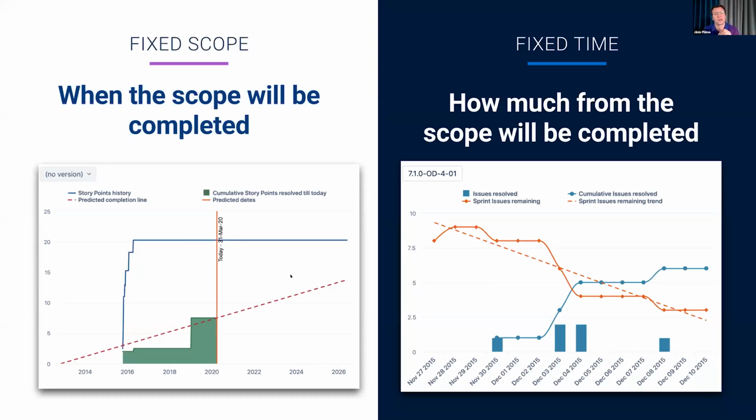It is a different situation with the approaches of doing work in sprints, which are the time-limited frames, and usually does not strictly say how much of the initial scope will be completed. The sprint scope usually is assigned by the expected velocity of the team, and it can also change over time, but the time limit of the sprint always remains strict. For both cases, burndown charts can help, though in a slightly different way.